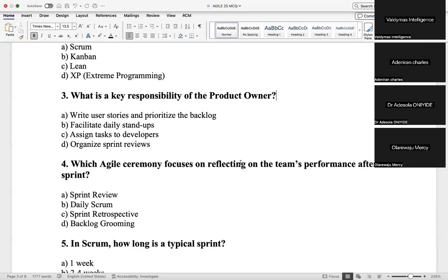People assign tasks to developers. Okay. Tasks to the development team will now be another thing. In Agile, we all have to agree together. So the Scrum Master, the product owner, and the development team, everybody would agree during the sprint planning that these are the stories that should move to the sprint. So you can't really say product owner assigns task to development team. We all agreed together.